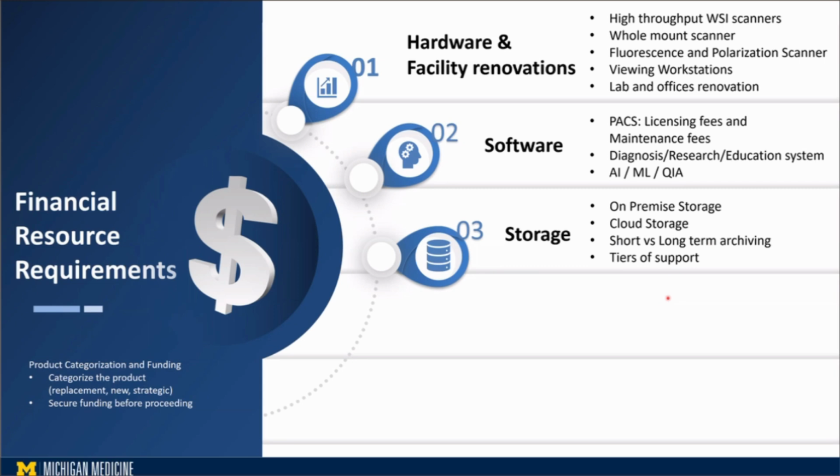I'll share with you one of the challenges, which is the financial burden. When we created the 10-year plan for the transition, the billing came back for storage at about $39 million for 20 petabytes on-prem. And that was a really insane amount of budget for just storage. This is nothing other than storage. So we decided we do not need this amount of petabytes to go live at this moment. All we need right now is maybe 2 petabytes to start the project.